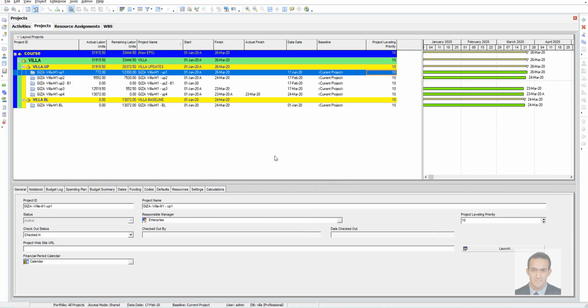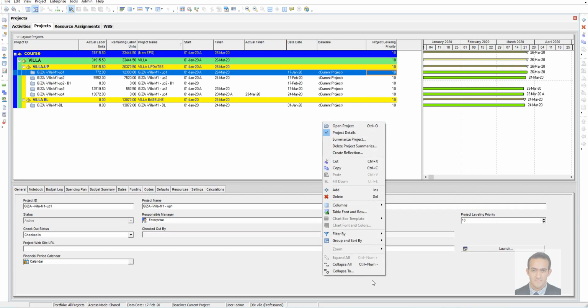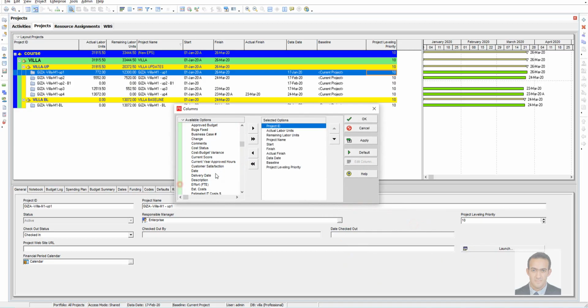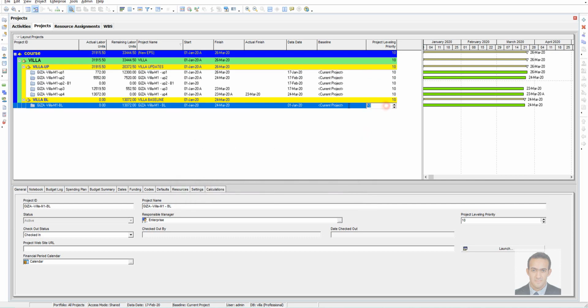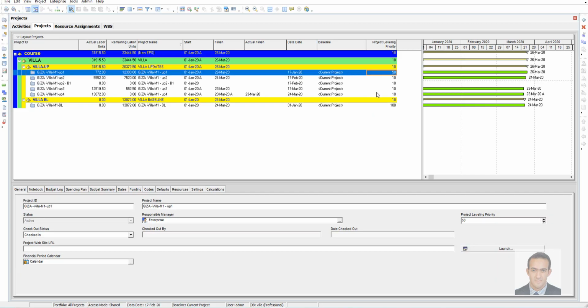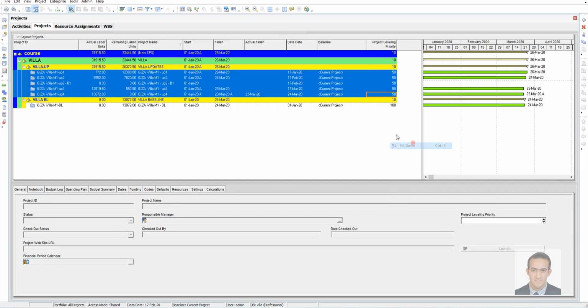The best way to do this, I will open here the Primavera, and then in the project level priority for you can use any way you found better. You can use like from custom, user define. You can check any valid option for you. But for me, I use this option. For the baseline, I click here 100, and for the update, I will make it 50. Like this, and select or fill down.